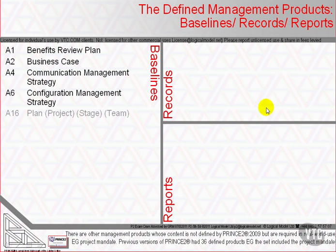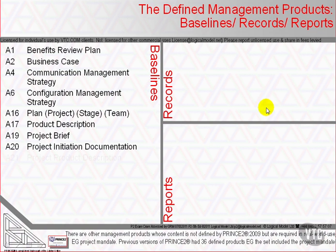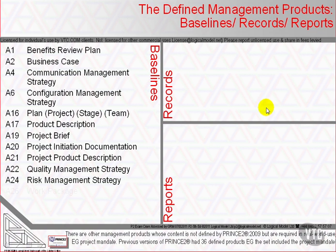Here are three important definitions. Baselines are those that define aspects of the project and, once approved, are subject to change control. All of them except the team plan are baselined by approval from the project board in a DP activity.